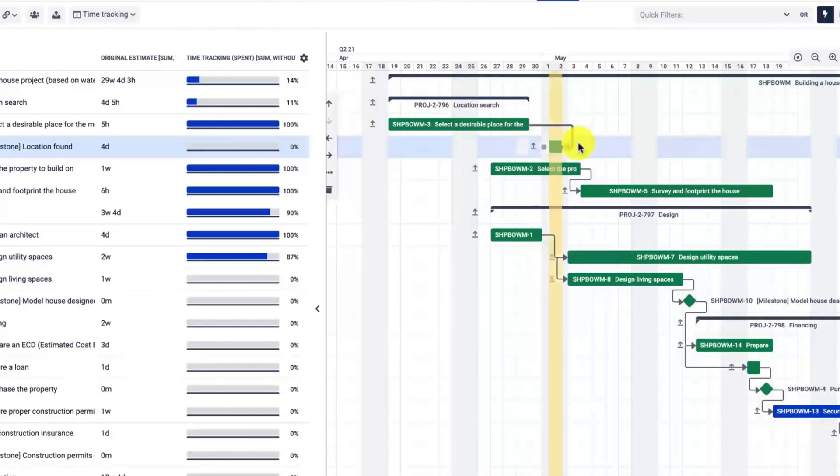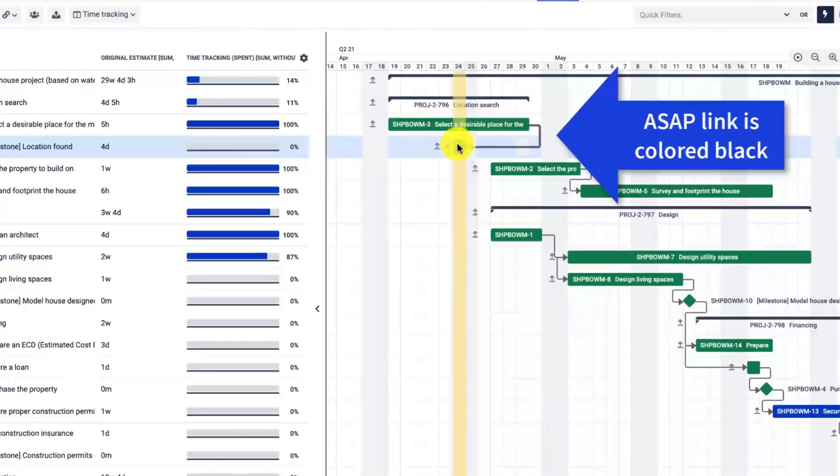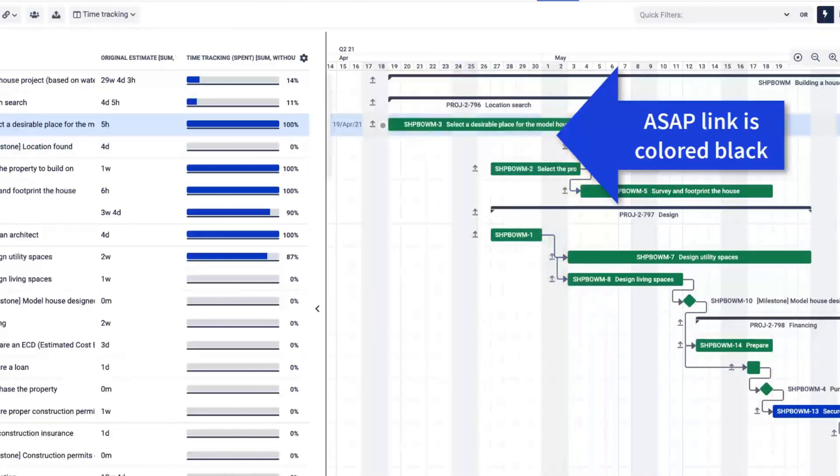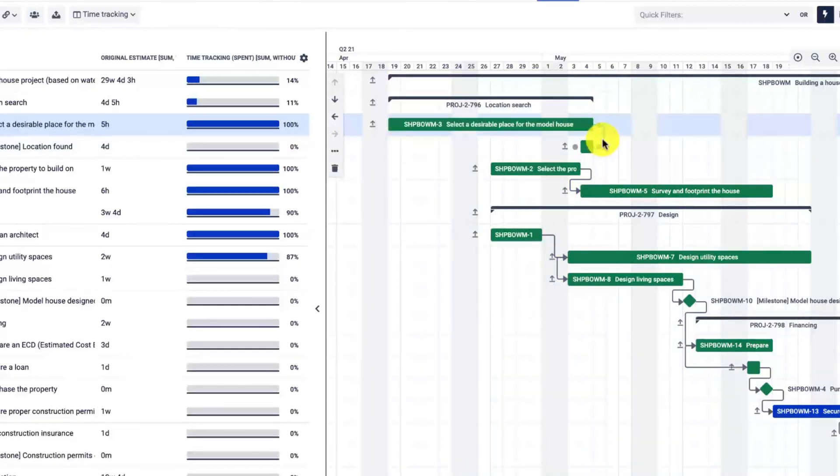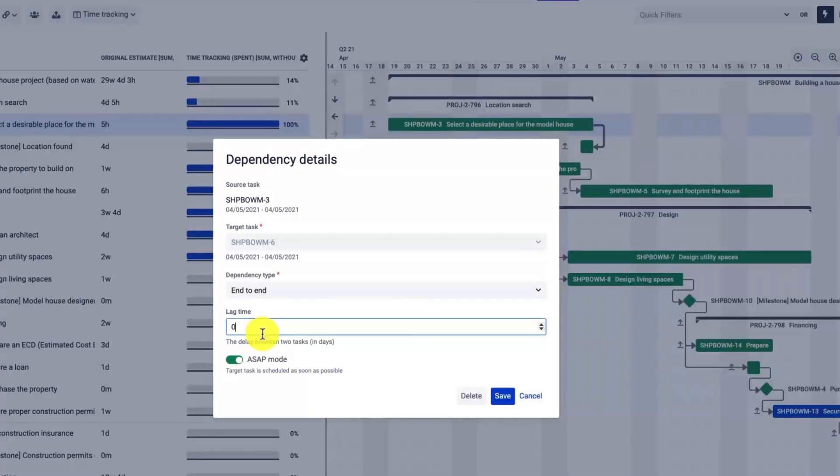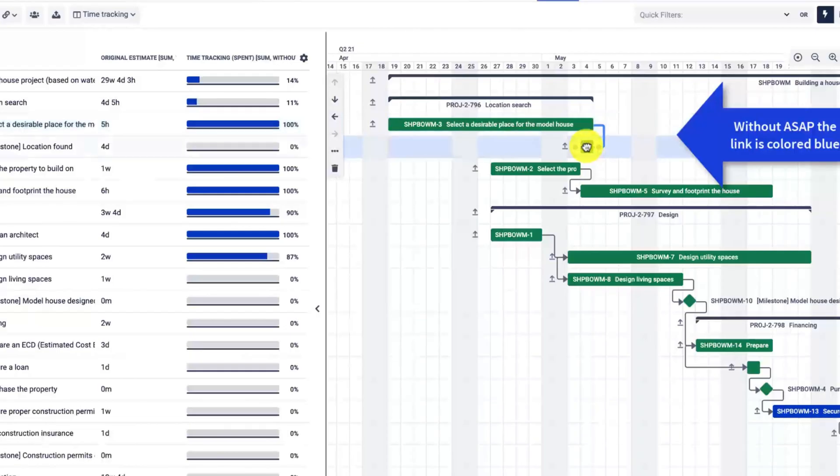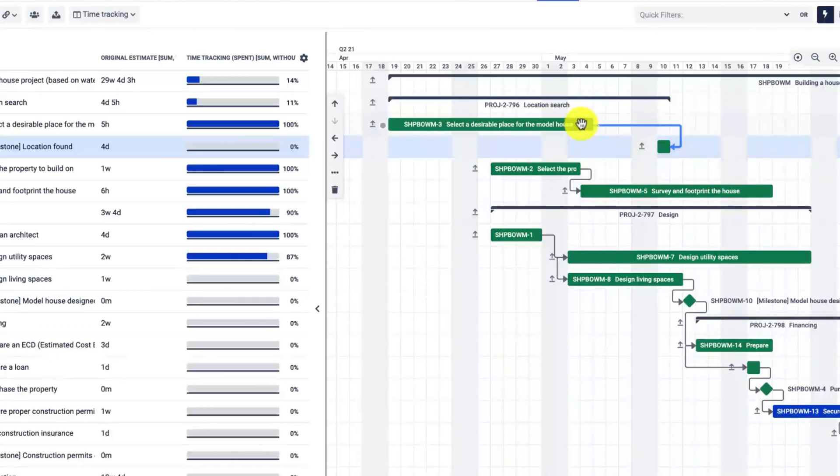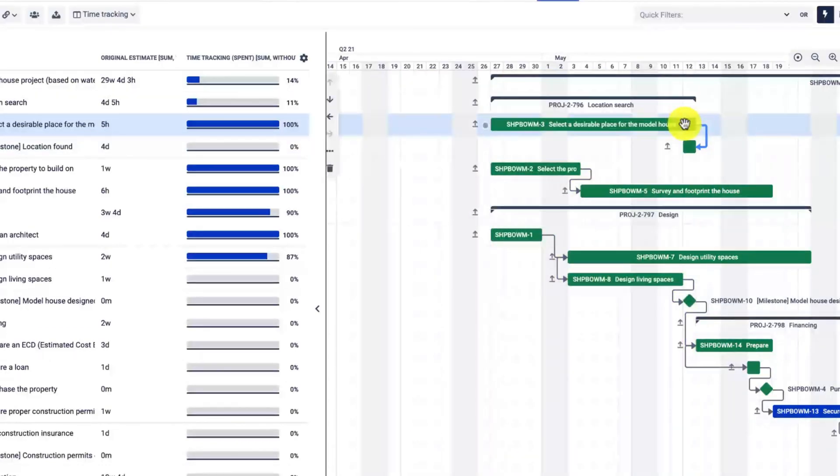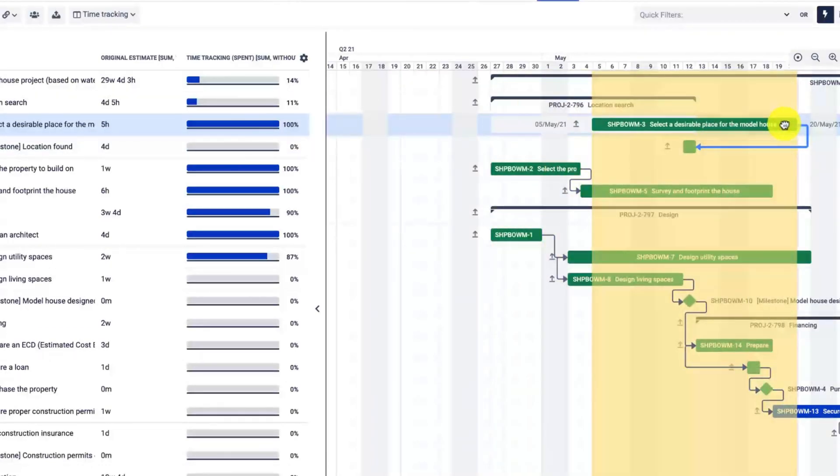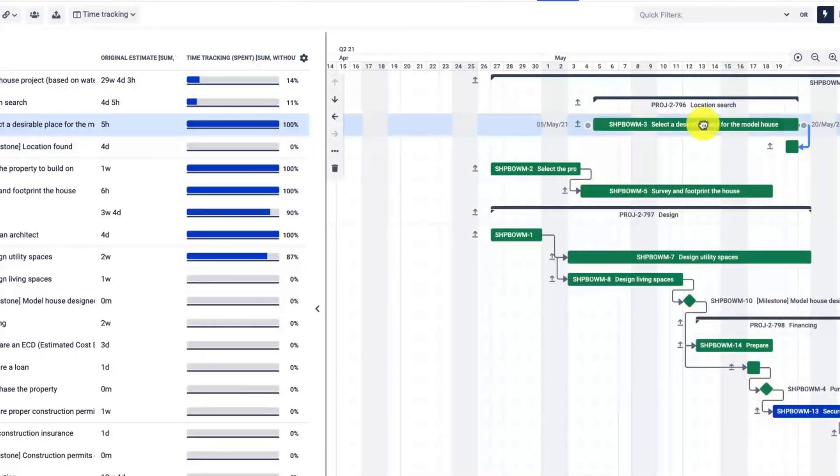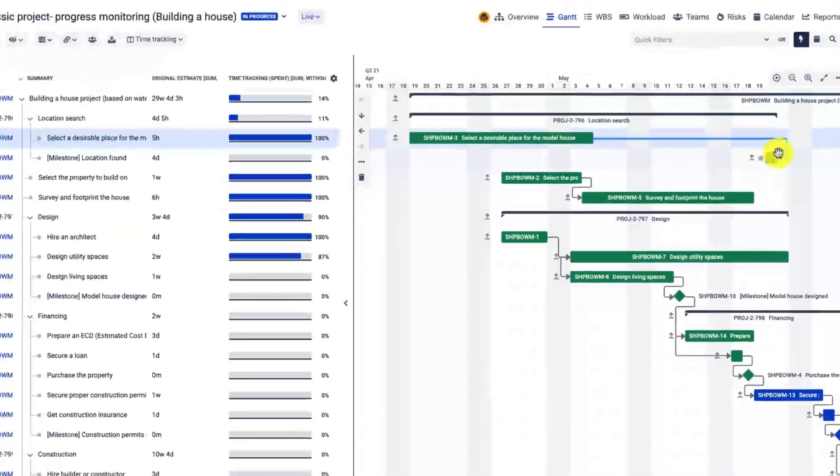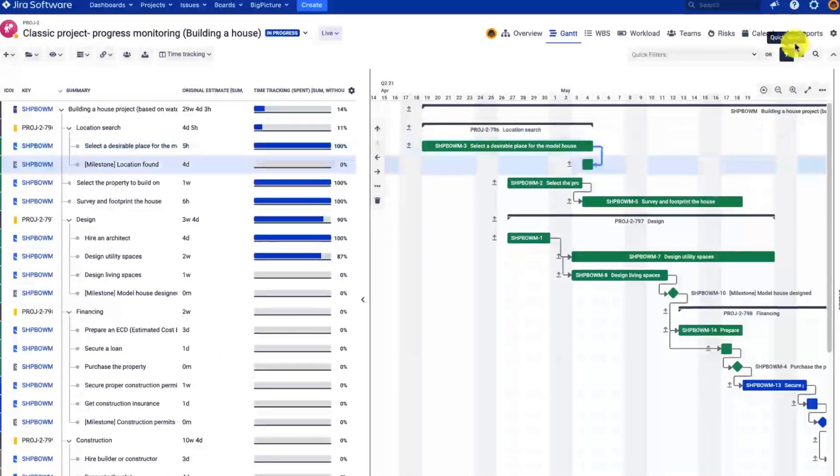When I try to drag and drop it, the linked issues either will return to the previous position or will not move at all. This is a kind of constraint that can prevent you from moving tasks. Now when I remove the as-soon-as-possible mode, you'll see that the successor can end later than the predecessor but not earlier than the predecessor's end date. This is very important—keep that in mind.